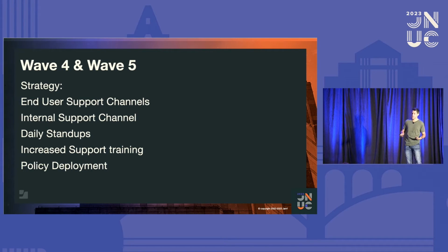because there's lots of crosstalk. People leave, and you're sending comms in that channel. It's not a good strategy. Plus, as we're doing more and more communication with our end users, we now have to direct them to the right channel. It was easier just to do one generic. So there's some pros and cons to switching from an individual channel for each wave to just one large channel for all deployment.